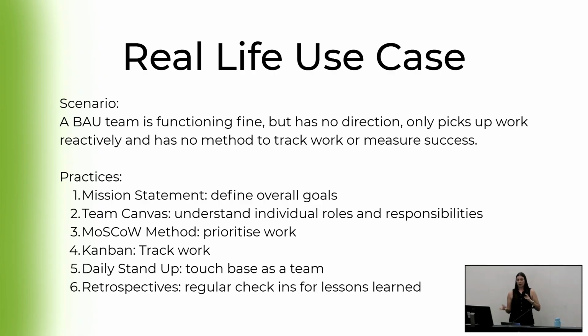One of the problems we had was we didn't have that overall goal. We weren't all working towards anything as a team. So I used the mission statement practice to help define as a team what our overall goals were. We looked at what our organisational goals were. So, working for a different organisation, what do they actually want to achieve? And how are we going to help them get there? And what resonates with us as a team to actually want to work there to get there. So we came together and we defined our overall goals, and that set the tone for the rest of the practices we did too.